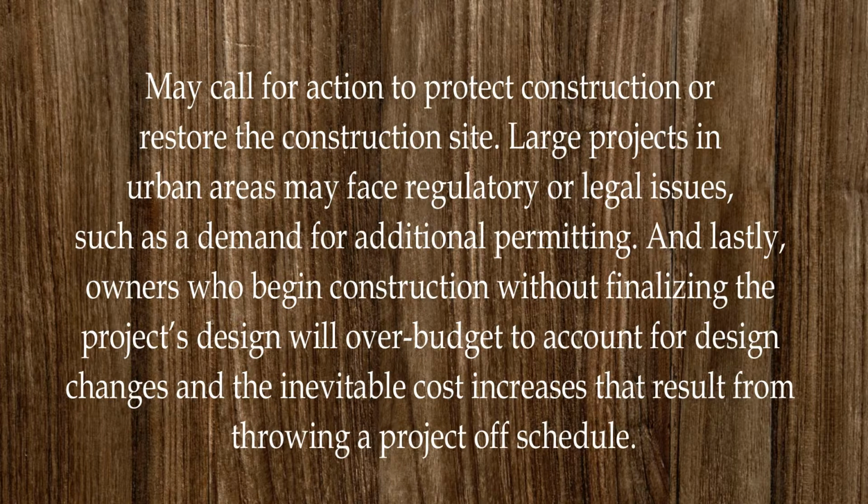Large projects in urban areas may face regulatory or legal issues, such as a demand for additional permitting. And lastly, owners who begin construction without finalizing the project's design will over-budget to account for design changes and the inevitable cost increases that result from throwing a project off schedule.